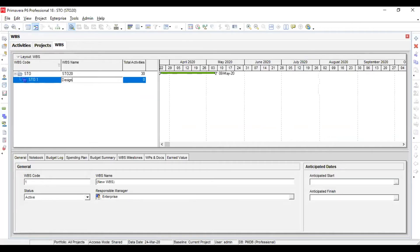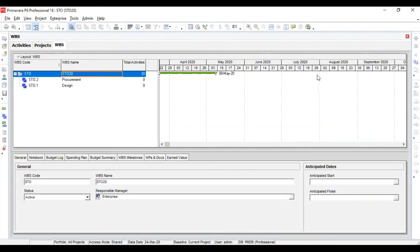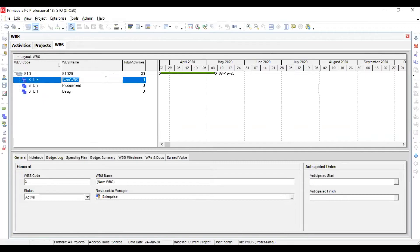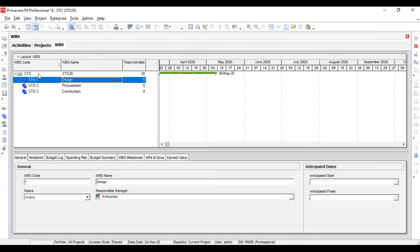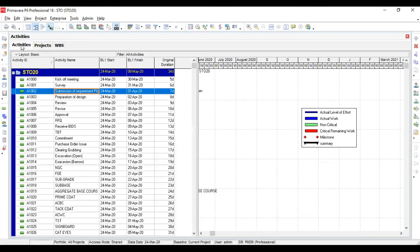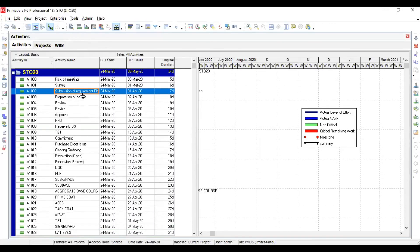After importing all the activities, go into your WBS and provide Primavera 6 the work breakdown structure as per your project requirement. I'm going to generate three WBS elements: Design, Procurement, and Construction, since my imported activities belong to these three phases. Your WBS is totally based on your contractual model and your project development. Set the sequence so that Design is on top.